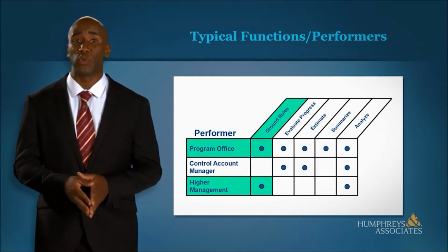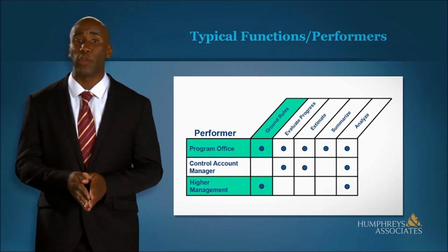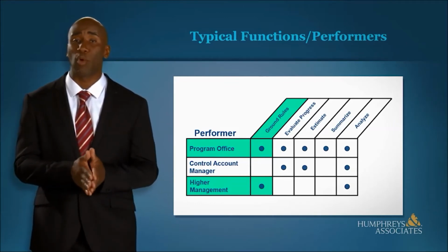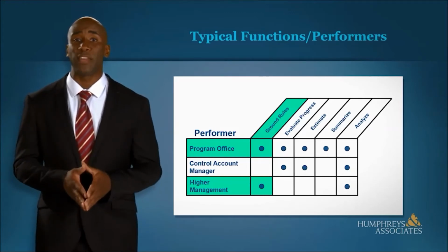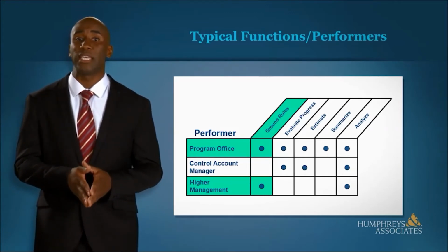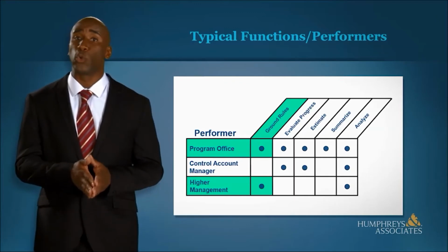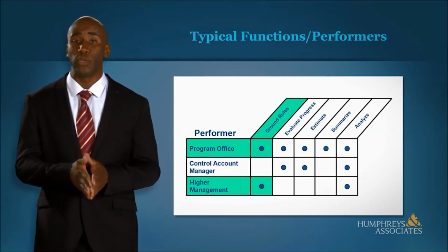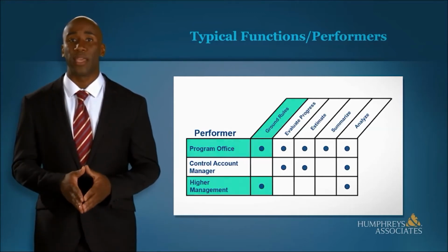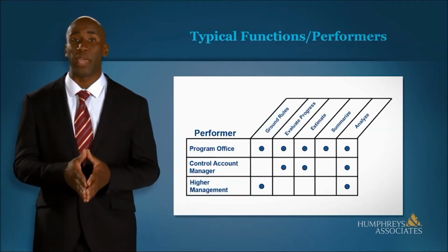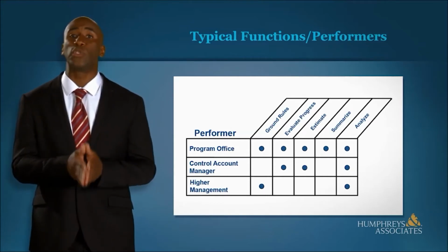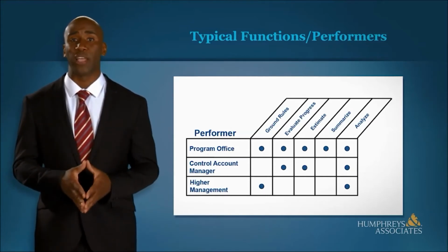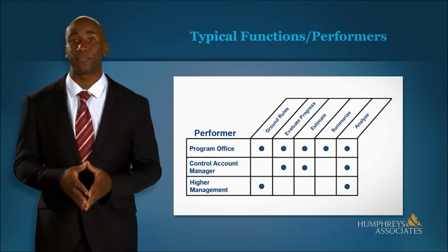Ground rules are established to ensure that all participants prepare their estimates based on the same project status. For example, definition is made for the start month for the EAC, schedules to be used, risk assumptions, subcontractor EAC updates, due dates, etc. The comprehensive EAC should be prepared with the most recently approved forecast schedule so that all participants are estimating against the same plan.